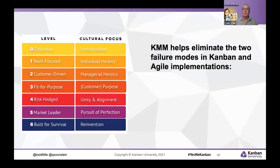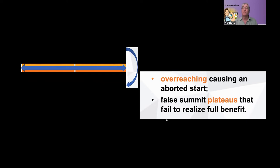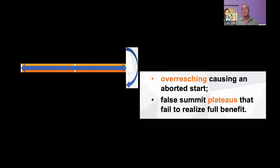The Kanban Maturity Model aims to eliminate two common failure modes in Kanban, Agile, and really almost any type of transformation. The first is overreaching: trying to do too much, where the organization isn't ready and it results in an aborted start. The second is a false summit plateau — getting to a certain point, realizing some benefit, and feeling like that's good enough, when in fact there is significantly more benefit available to the organization or team.